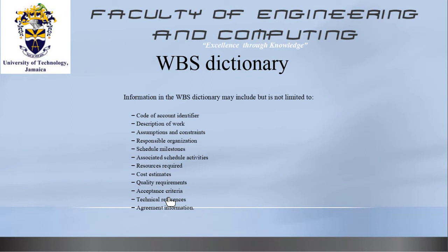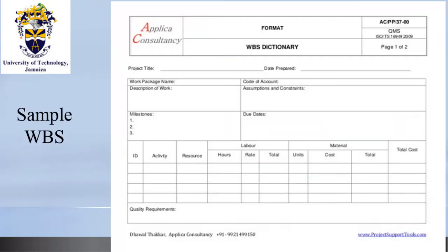So all costs that will accrue to the project, you must state. If it's a zero cost, you state that, hey, I'm getting this resource from the organization, and so a cost will not accrue to the project, etc., etc. Very important. The WBS is going to be a fountain of information for you.